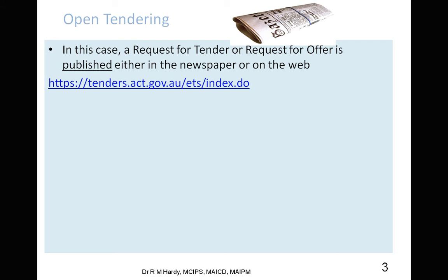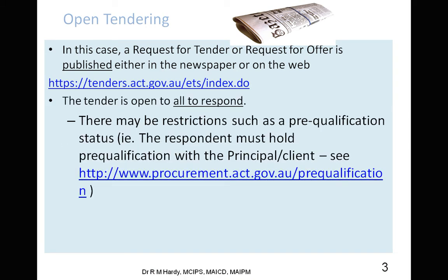One of the characteristics of this form of tendering is that tenders are open for everybody to respond to, although in some cases there may be restrictions on pre-qualification to make sure that they are qualified to do the job at the end of the day. Quite often, if there's no pre-qualification asked for in the tender, you would have to prove that you've got a certain type of builder's registration and so on and so forth to be able to undertake and complete the job.